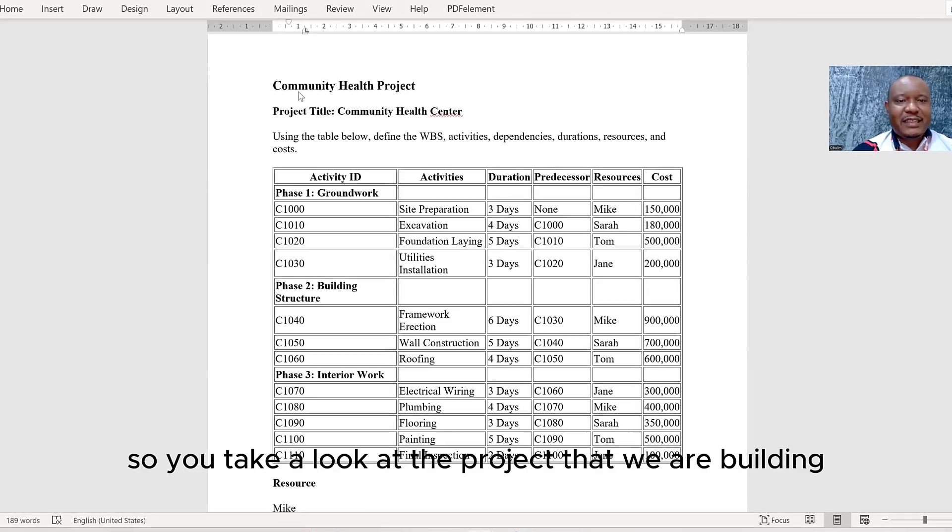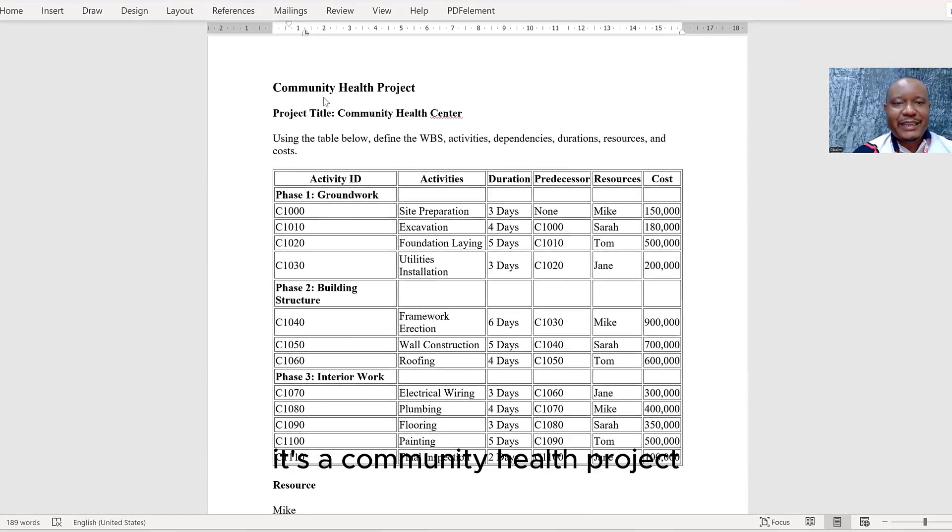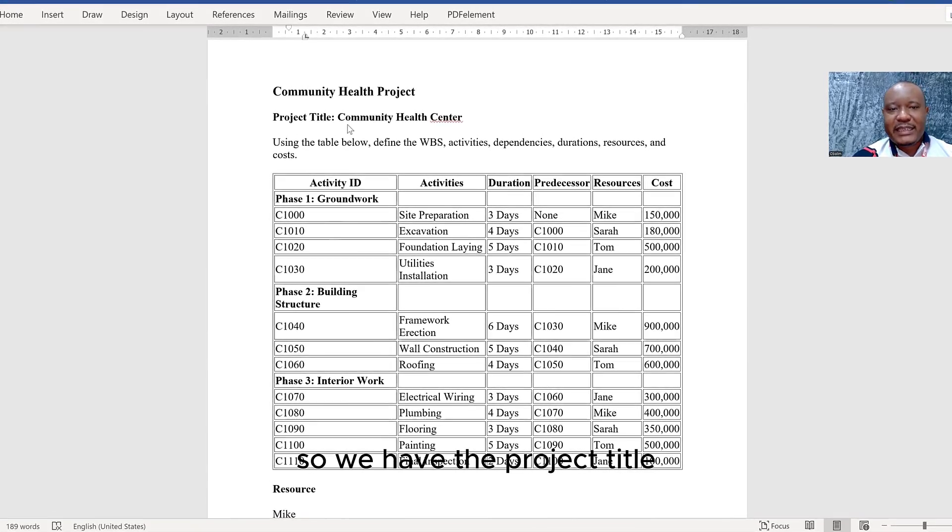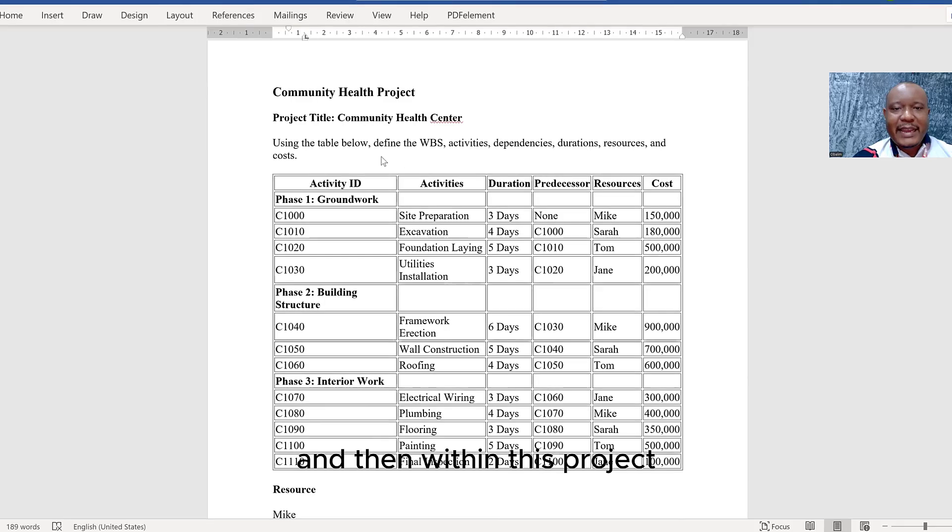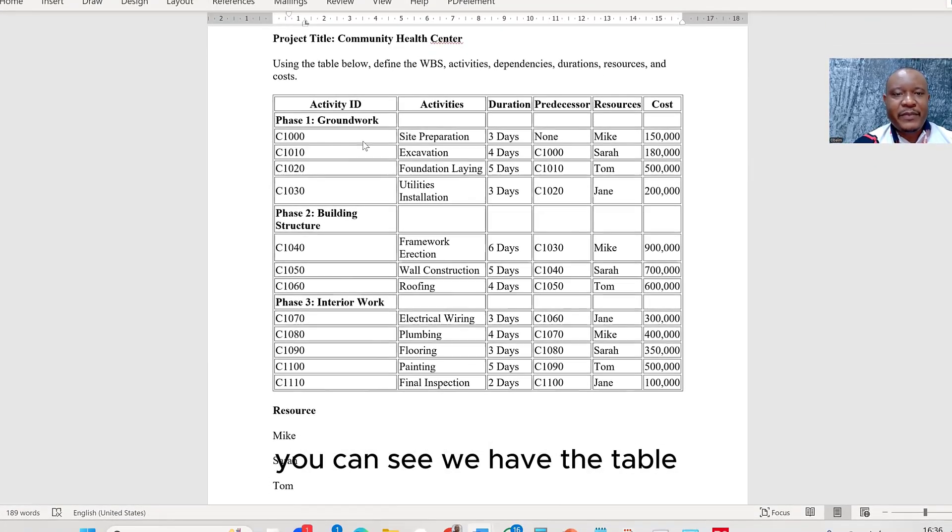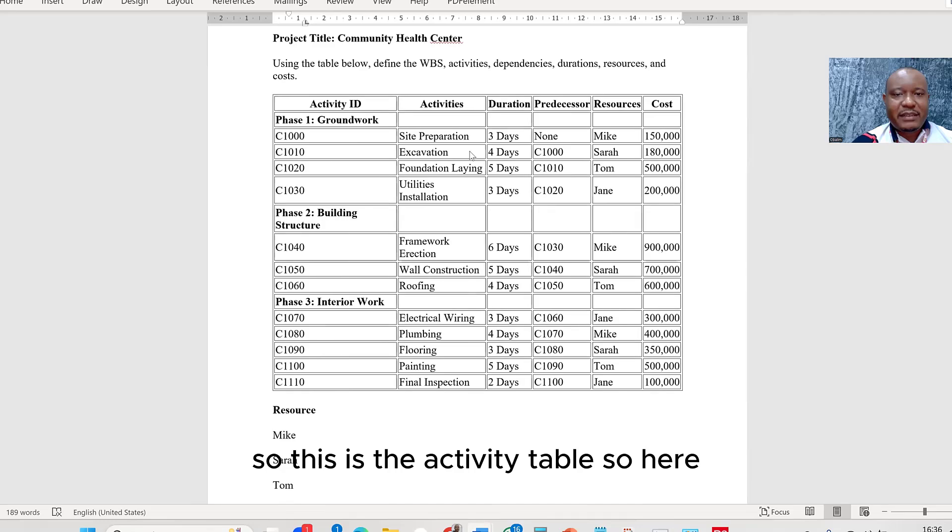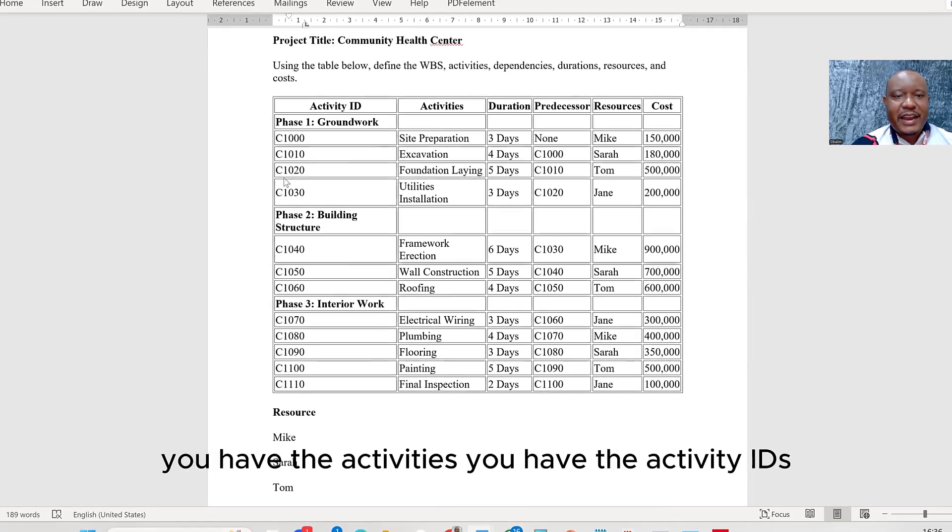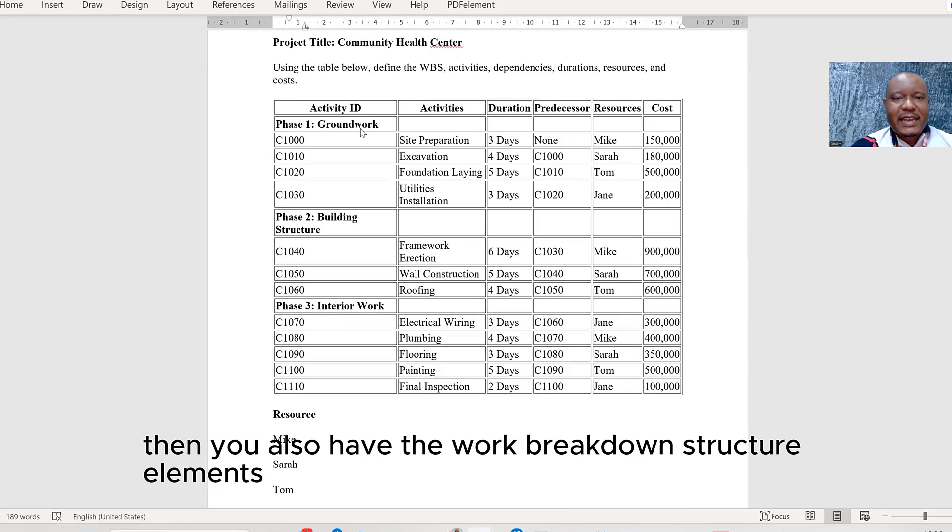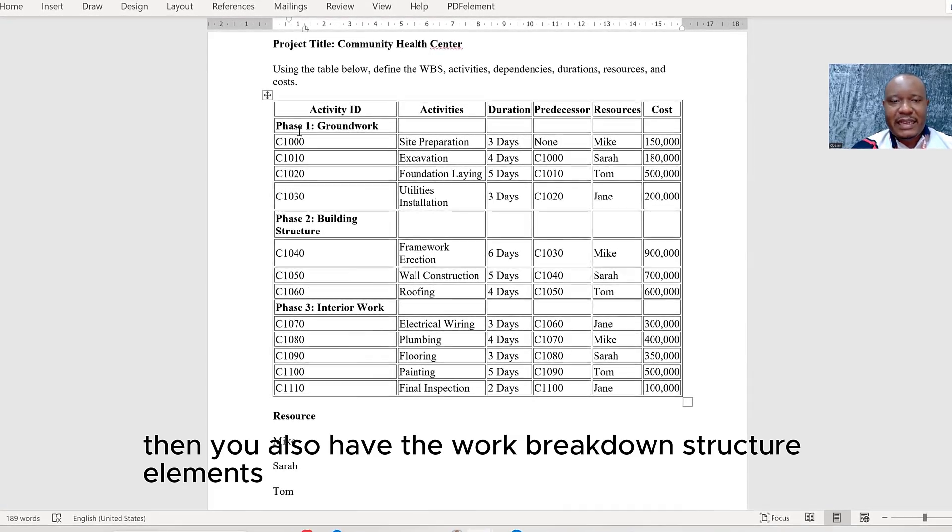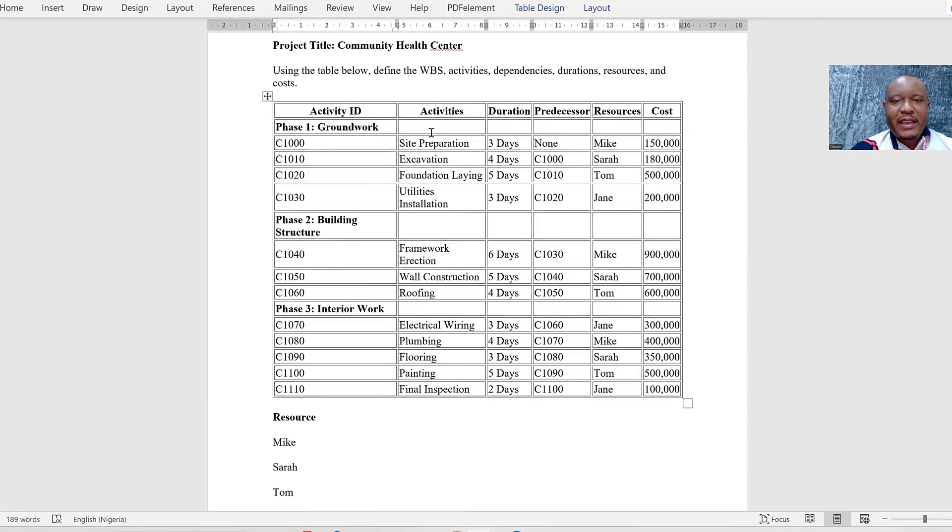So if you take a look at the project that we're building, it's a community health project. We have the project title, which is Community Health Center. And then within this project, you can see we have the table. So this is the activity table. Here you have the activities, you have the activity IDs, then you also have the work breakdown structure elements: phase one, phase two, and phase three.